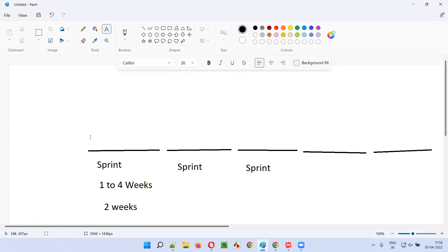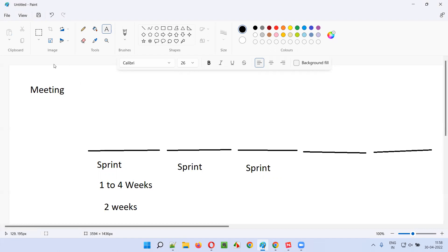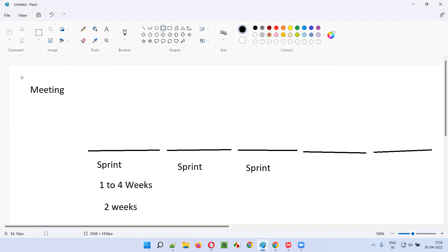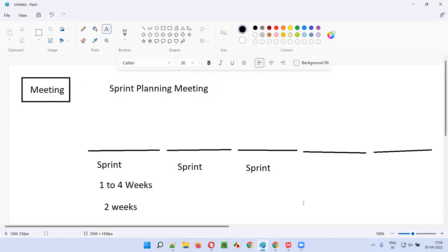But before the work gets assigned to the sprint, there will be a meeting conducted. The product owner will conduct a meeting with the scrum team and scrum master to decide on what work needs to be assigned to the sprint. That meeting is called the sprint planning meeting.